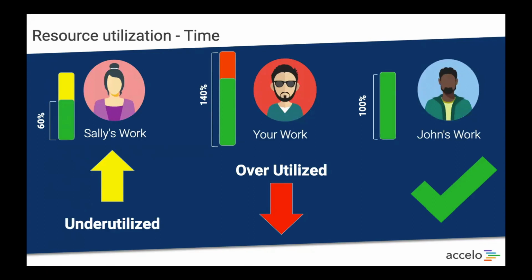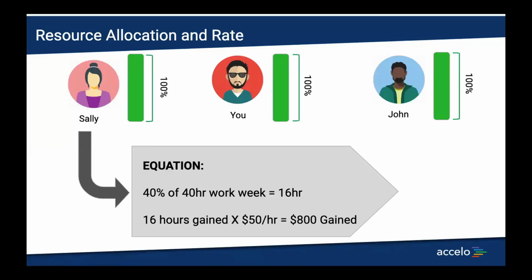Another way to look at this, as we shift some of those skills and some of those pieces of work, is that we can also look at this resource allocation based on our rates. And it allows us to really get an idea of profitability, and we can potentially even increase our profitability. If the hourly rate that we are charging the client stays the same for the work, regardless of who completes it, and we're able to move it to one of the associates rather than somebody who's in the leadership position or in the executive area, the rate that it costs the company is less.